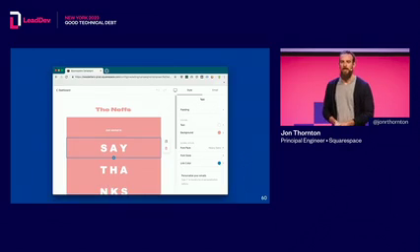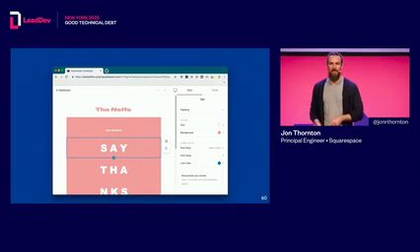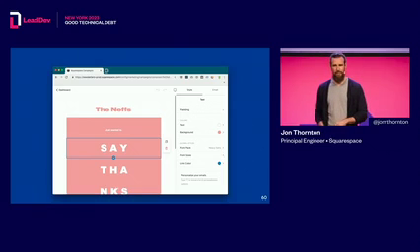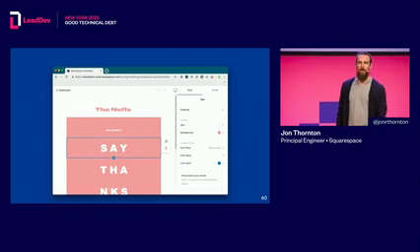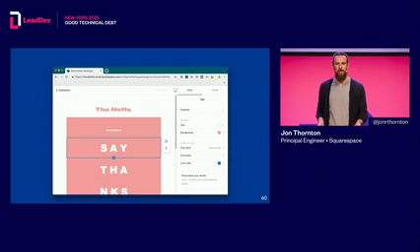There we go. Now, we knew we needed the email editor to be really awesome for our project to succeed. But none of us had ever built something like this before, and we weren't at all confident that we'd get it right the first time. We wanted to work on it first so that we'd have the option of throwing everything away and starting over, which we actually did a few times before we got to the point where we were feeling good about it.